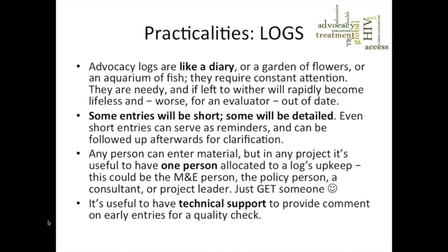Any person can enter material into the log. But it's useful to have one person identified who fills in the advocacy log and makes sure it's kept up to date. It could be an M&E person if there's an M&E person, or it could be the policy person. It could be a consultant or the project manager, just as long as somebody checks in maybe every 1 or 2 weeks and just keeps it up to date, keeps topping it up, just get someone to do it.